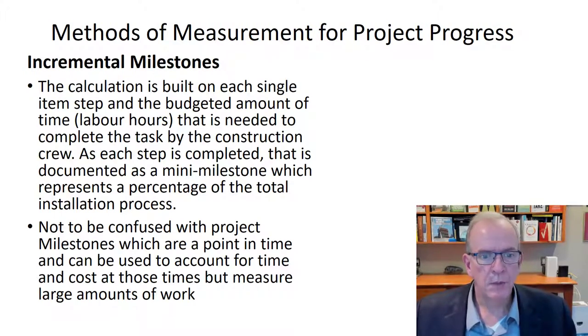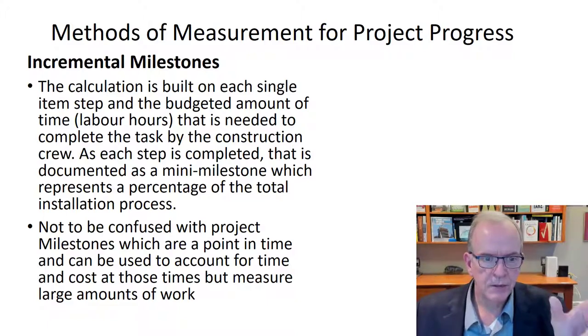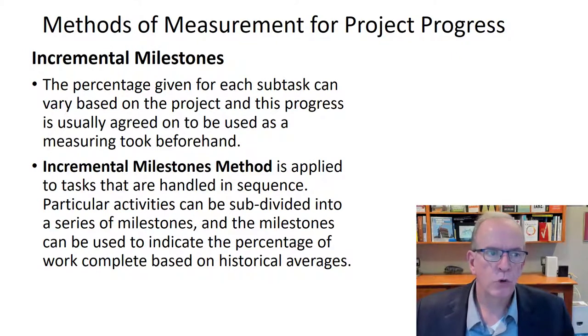But the incremental milestones is measuring those, breaking it down into a series of tasks, assigning amounts or costs to it, and then measuring each one. How much is this costing, and how much complete is this portion of the work, for each subtask, so that you've got a really good detail on that particular item of work.